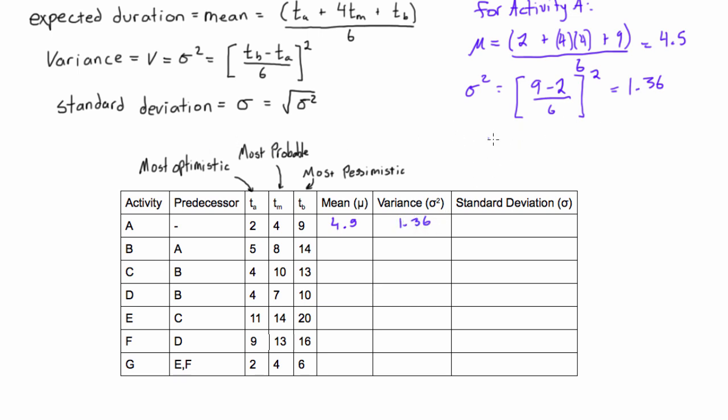And then standard deviation, literally just take the square root of that, and you will get a value of 1.17, there you go. All right, so we would put that in for activity A.